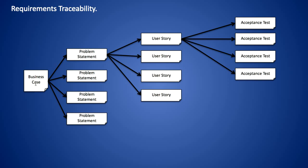What we do as a team is break the business case out into what we call problem statements, value statements, and warranty statements. A problem statement is a description of functionality we're trying to provide that will resolve an existing business problem. A value statement is functionality we could provide to realize a new business opportunity. A warranty statement is a contract between ourselves and the customer for ongoing levels of service that we need to ensure remain in place.